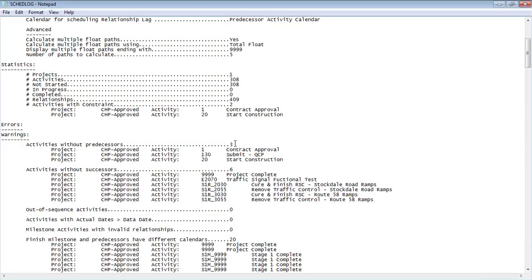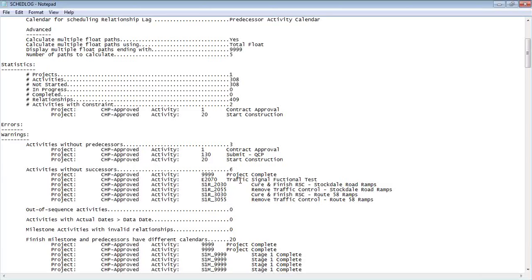The correct answer, of course, would be one open end as far as a predecessor and one open end in terms of a successor. So if we see one and one, we're good to go. Any other numbers, we need to check this.